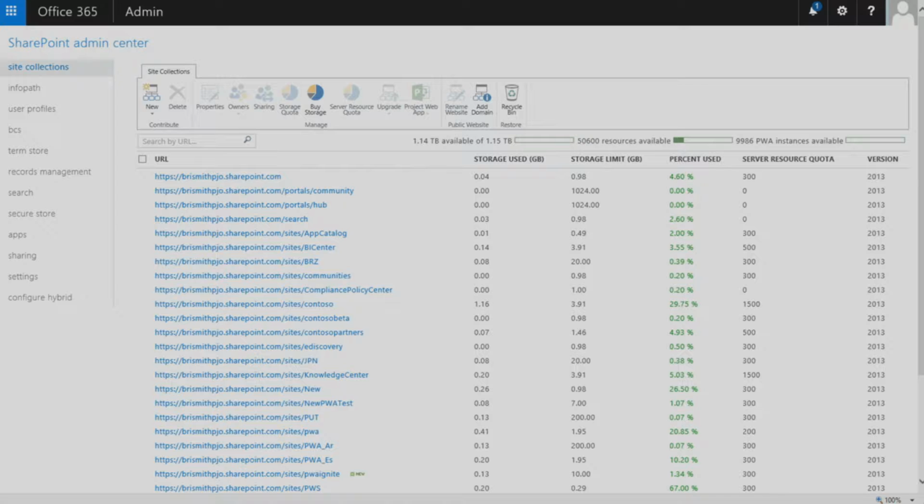After you've acquired a project license, what you can do when you create a new site collection is either create a team site, like a vanilla SharePoint site, or you can create a site collection with the project features enabled. So you have 2 options at this point. And you have to talk with your business groups and whoever is deploying project and how many instances they want. Do they want one big instance for everyone or different instances for each business unit?